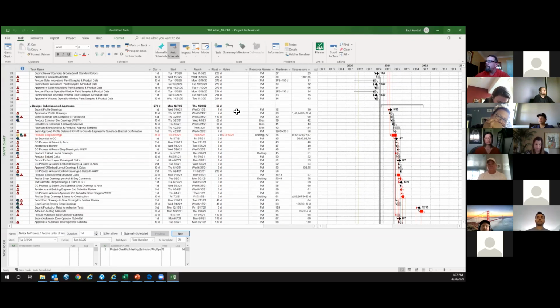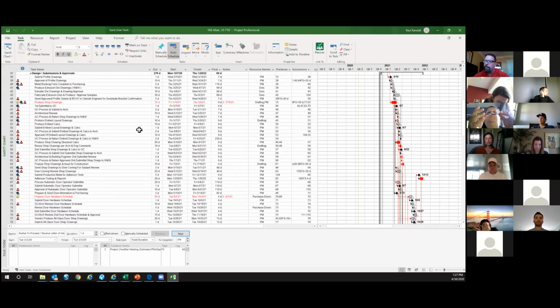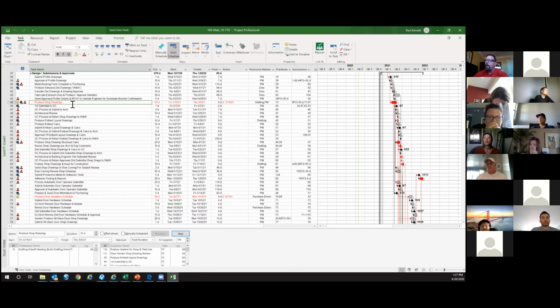the key dates that you'll see on the production schedule, what I like to do as a little tip, is highlight in red on my schedule all of those dates that reflect back to the rest of the departments that you're working with. So these dates all correlate to the production schedule. So the shop drawing date, I like to highlight it in red, and then I like to keep a note section that shows me the date that the production schedule is keeping.